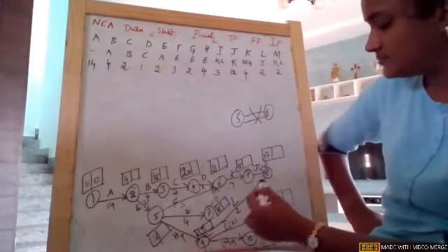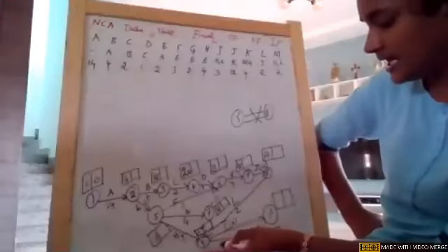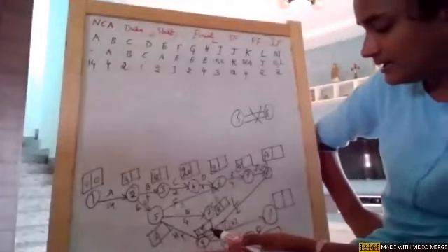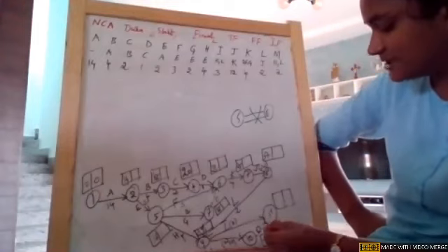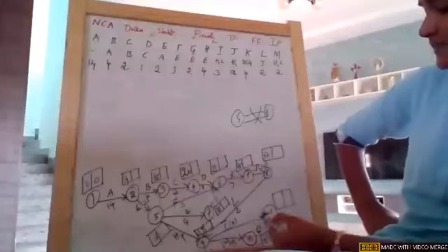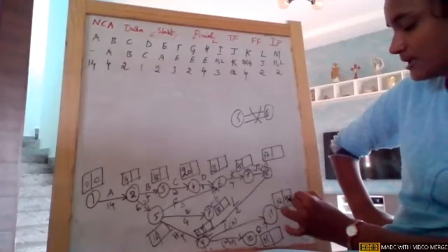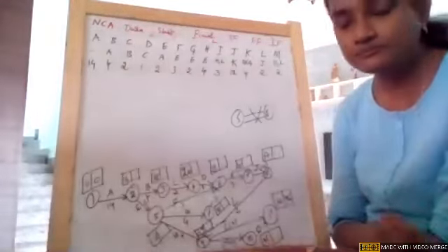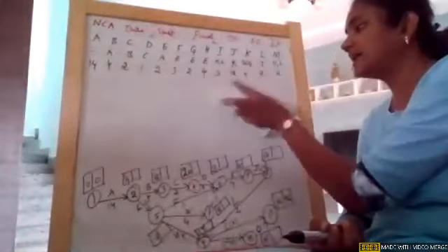Then from 9, we are going to 10. So 39 plus 2, 41, near node 10 with a single arrowhead. And node 11 has 2 arrowheads. 41 plus 0 is one arrowhead, which is 41. And 39 plus 3 is the other arrowhead, which is 42, the maximum value. Are you understanding? Did you follow? Any doubt in this representation? Earliest times, this is how we calculated.